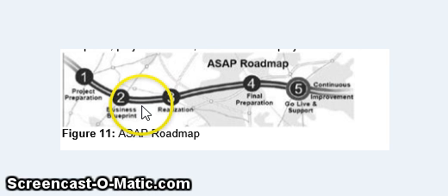The third step of the ASAP project roadmap is your realization. In the realization phase, you configure the requirements contained in the business blueprint. Baseline configuration is followed by a final configuration, which can consist of up to 4 cycles. Other key focal areas of this phase are conducting integration tests and drawing up end-user documentation.